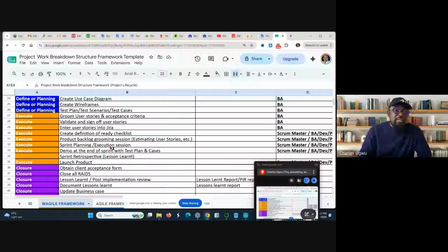That is sprint planning. If we are using sprints, every two weeks or every one month, that's what we call sprints. It's the duration where the team will bring a small part of the project and complete it. We call it project iteration. We are going to treat them one by one so that you understand it very well. Within this sprint, we'll continue to cycle and cycle and cycle until we finish the project. That's what sprint and execution is, not just one-off.